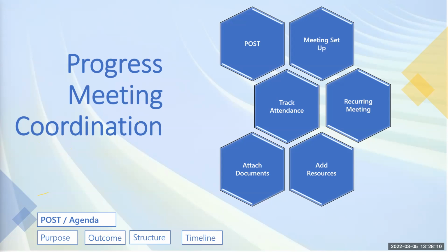So there are certain meetings that are part of the governance of projects, regular meetings, either the weekly team meeting or the more senior meetings like a steering group meeting or project board meeting or SteerCo, or even the CAB that Mary has talked about, change approval board, change management board, those governance boards. Usually what you would have for those meetings are what you call terms of reference.